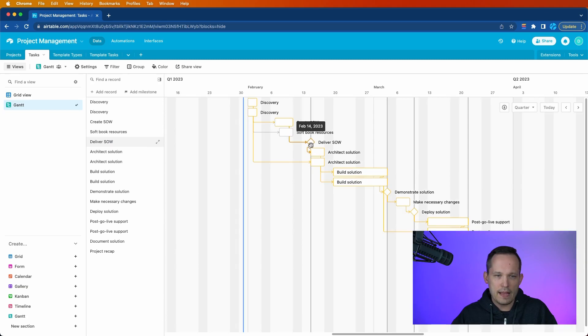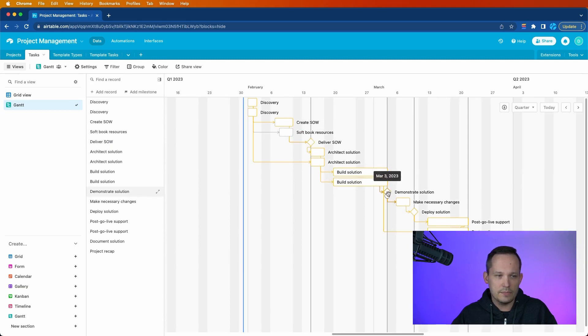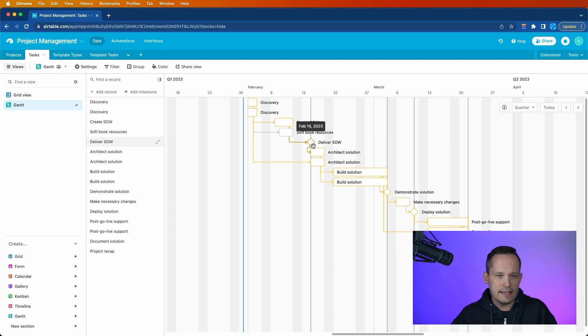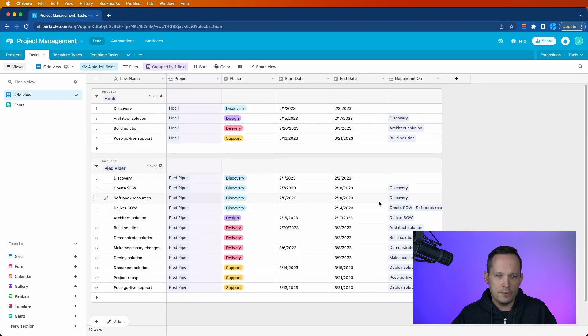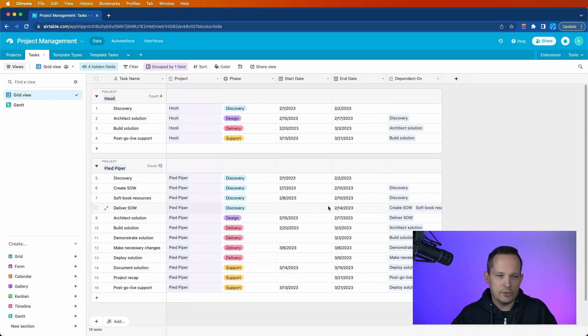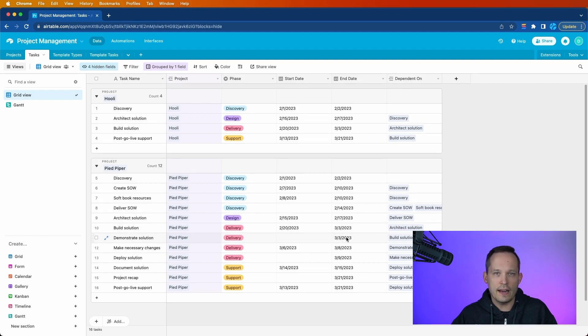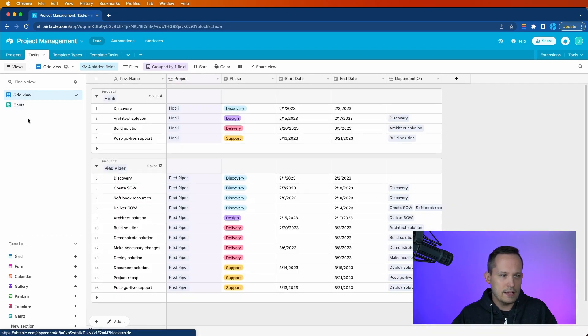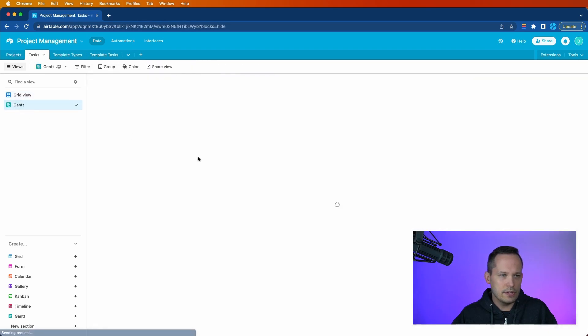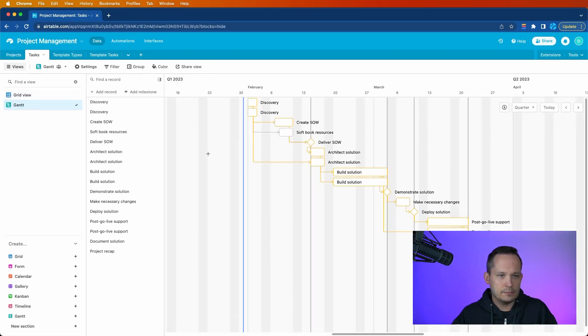And you'll notice right off the bat that those milestones or the single date items, in order to get it to appear as that diamond that you see when you're on the grid view, you'll notice that those items just have an end date. They don't have a start date. And it's going off of that end date to determine both that it is a milestone and the date of that milestone. Let's head back into the Gantt view.